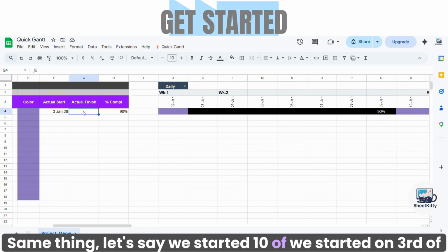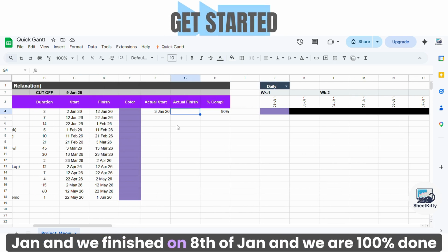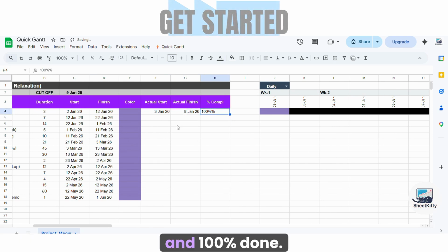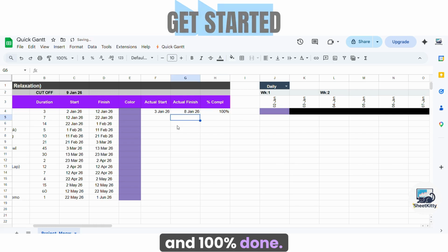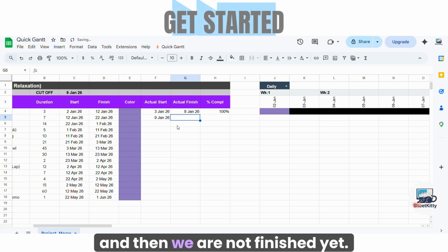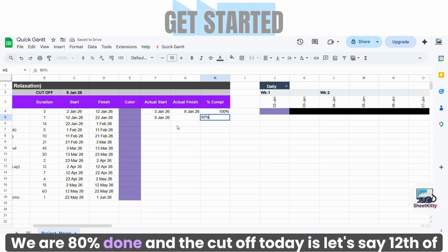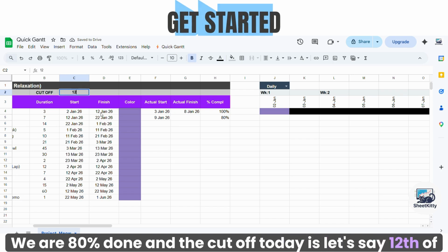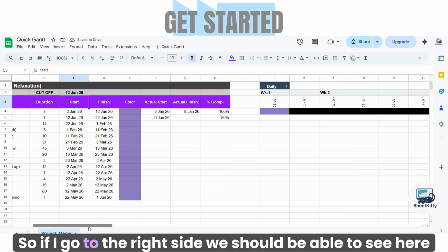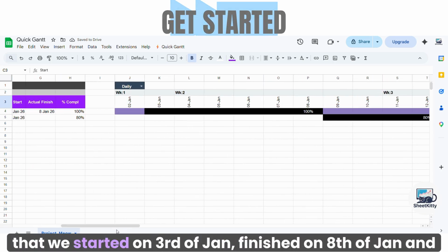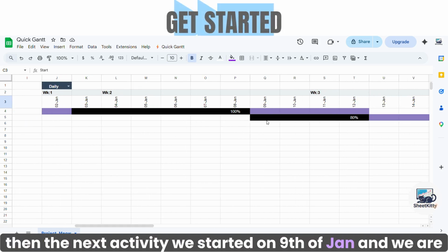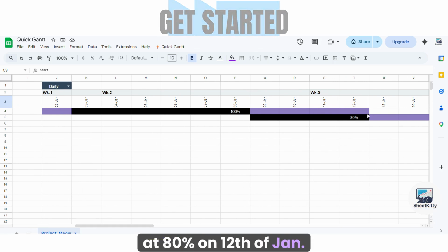Same thing, let's say we started on 3rd of Jan and we finished on 8th of Jan, and we are 100% done. And let's say the next activity we are starting 9th of Jan, and then we are not finished yet, we are 80% done, and the cutoff today is, let's say, 12th of Jan. So we are updating the schedule on 12th of Jan to the status. So if I go to the right side, we should be able to see here that we started on 3rd of Jan, finished on 8th of Jan, and then the next activity we started on 9th of Jan, and we are at 80% on 12th of Jan.